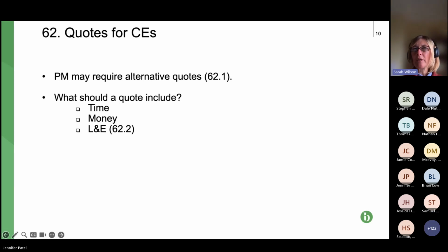It makes sense really if you've provided two quotes and then you give a reminder to the PM that it hasn't accepted or rejected, and that reminder means that if the PM still doesn't respond in a further 2 weeks, that it's deemed to have accepted the quote, then you need to specify which quote they're deemed to have accepted. Next slide, please.